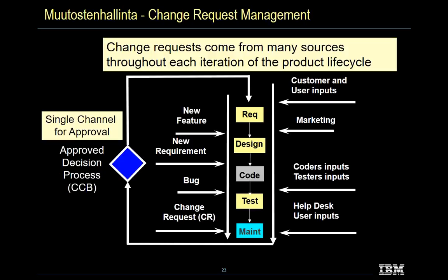Remember, every change request you incorporate has an impact. If you get a new requirement, it might change your live date. It might require 2 more weeks, 3 more weeks. It might require additional work. It might require additional resources. It is possible that we may not be able to finish the project in the time we have stipulated.